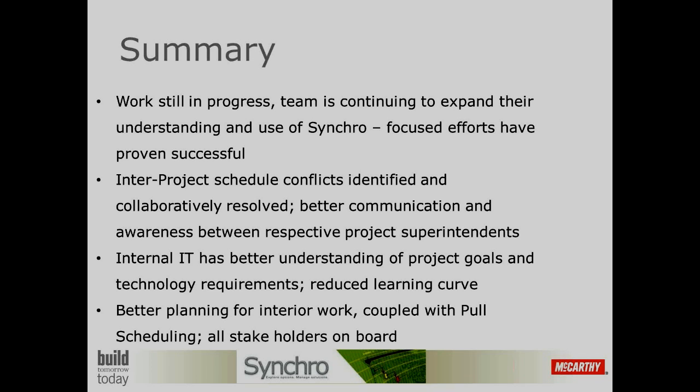Right now, we've got almost 400 total changes on the project across the board, and we have not pushed out the schedule. The end date has not pushed out. We've been able to accommodate those, incorporate them in, and feather those changes in as we go. The internal project conflicts are identified and collaboratively resolved with the team. It's huge. Those are obviously delays that are mitigated.